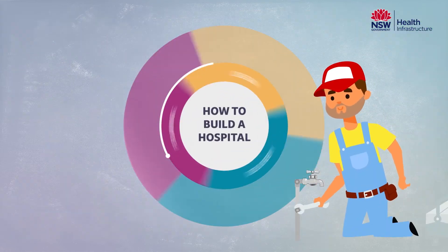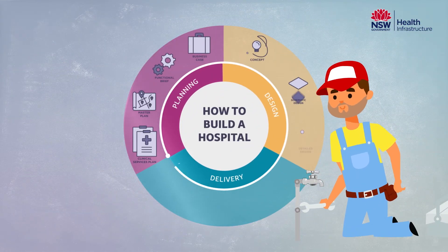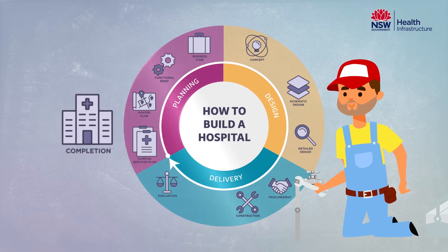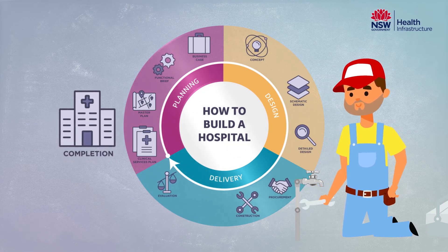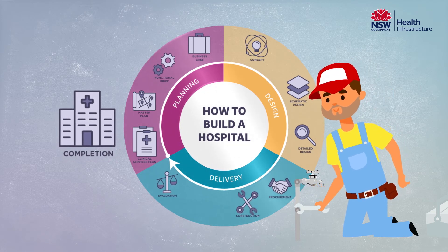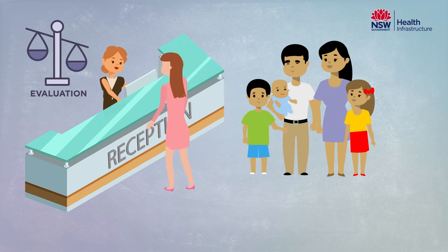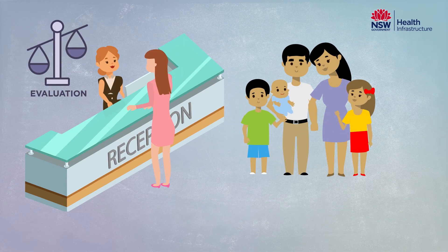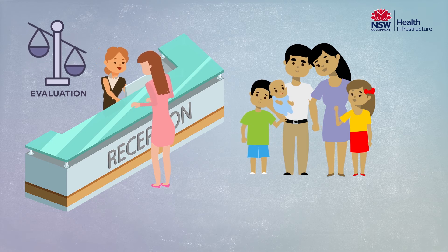Once construction is complete, we begin the commissioning phase. This involves checking and testing of all components and systems of the new facility. Staff orientation and training also occurs to ensure everyone is prepared to welcome the first patients through the door.